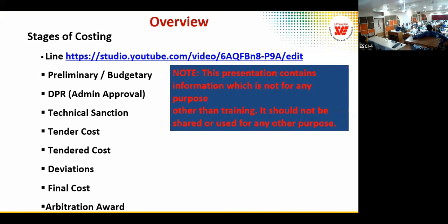So why not, as per CVC guidelines or certain state governments' procurement guidelines, where the variation cannot be more than plus or minus 20%, 25% in some departments, 15% in some departments. Why don't we implement that for consultants also? Sir, you are telling less. I have seen in Chennai, Tamil Nadu, in one government tender itself, one consultant quoted minus 70 lakhs. That means he will pay 70 lakhs to the department if he is awarded.